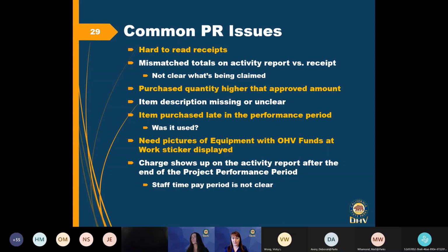We need pictures of equipment, like Maria said, with the OHV Funds at Work sticker displayed. A lot of times we won't receive that. We need it by the closeout in order to close out that project. So sometimes there can be delays, but do make sure that's included.